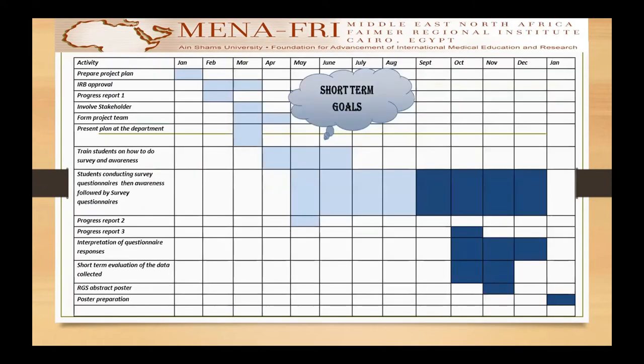According to my Gantt chart, I gathered a group of seven students — my main plan was five, but I gathered seven students in my team. I formed the project team and we started the training process. I trained them on the main aspects of the problem: what is the prevalence of the problem and how management is available for the children.